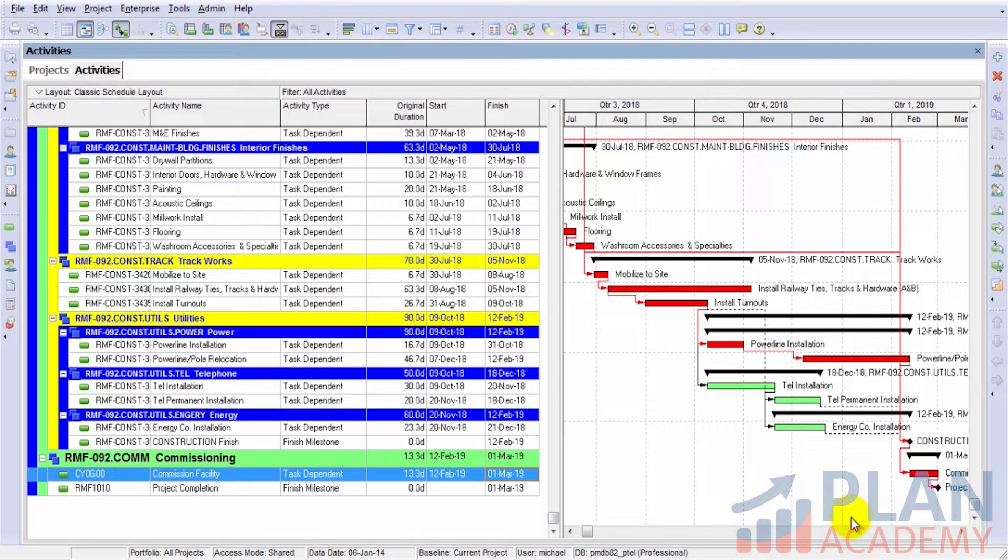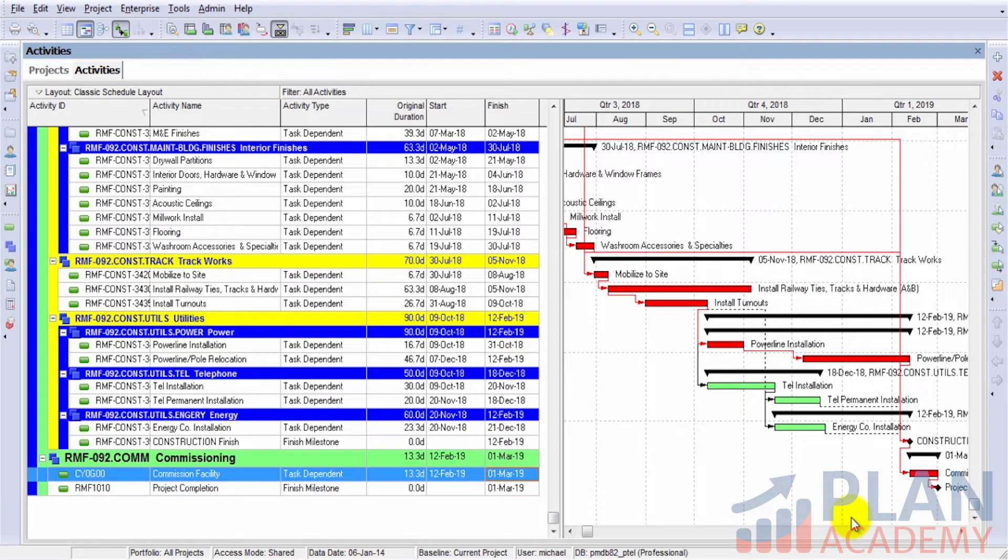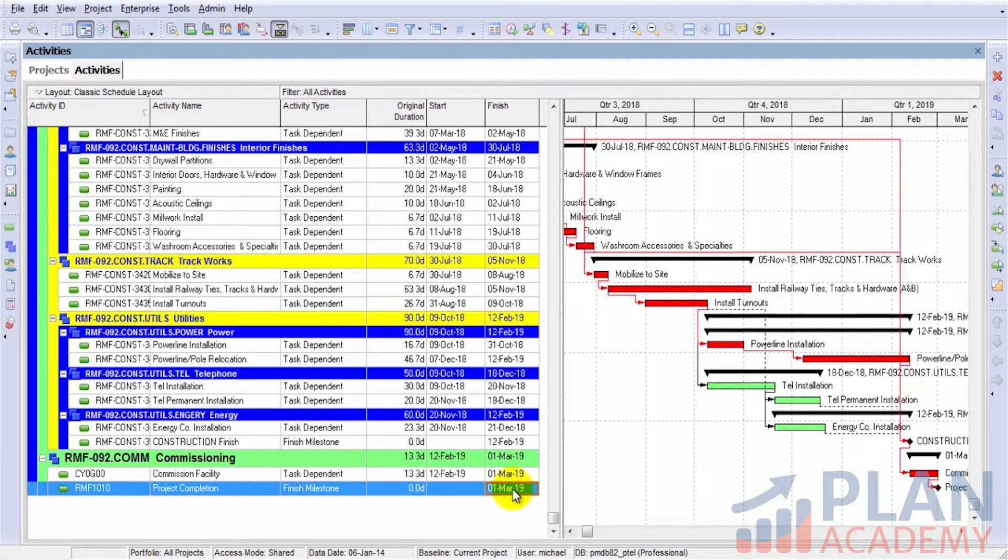As I mentioned, the other output from CPM Scheduling that we get is the project's finish date. So we now know that this project finishes on the 1st of March 2019. It's quite a lengthy project.